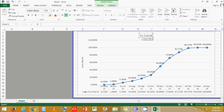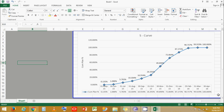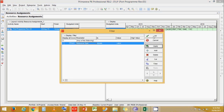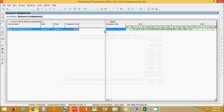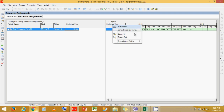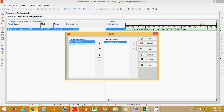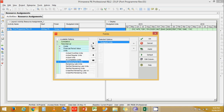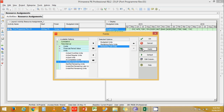This is a typical example of how an S-Curve is made in Excel by exporting data from Primavera. Let's change the chart title to S-Curve. Now to go further in depth, let's come back to Primavera. We'll learn about preparing a late S-Curve. Let's go to Resource Assignment and make sure you have the filter Resource Type equals Labor assigned to the spreadsheet fields. Now we have the spreadsheet field as Budgeted Units and we need to change it to Remaining Early and Remaining Late units — let's select Time Interval Units.